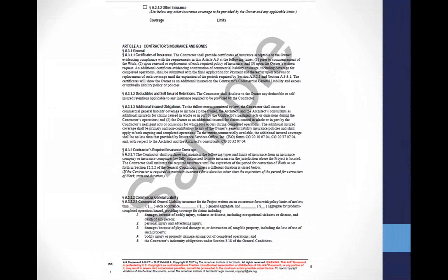We kind of generally know what this means, but until you've actually been through a negotiation with an insurance company as to how they're going to interpret bodily injury and property damage, I want you guys to appreciate that this is the limit of the coverage that you're obtaining unless you go to the prior slide and you check all those boxes. The AIA changed the prior slide with all the boxes to basically put you on notice that if you don't check those boxes and allocate that amount, you're effectively potentially uninsured for those. That doesn't mean you're without risk, because those indemnity provisions that exist in 3.18 of the general conditions are going to remain.